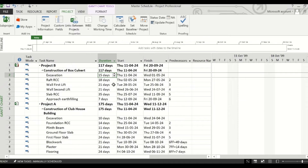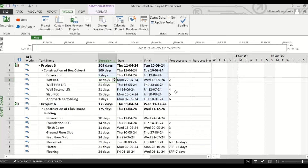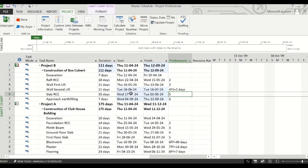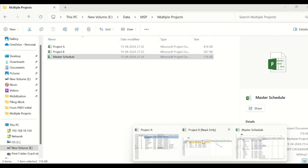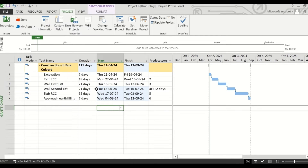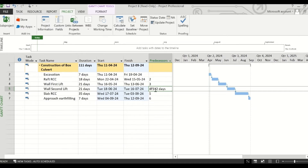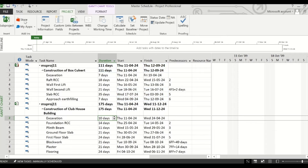If you change any of the duration or the predecessors of any task, that will reflect in the original schedule. Suppose you change the duration of the excavation to 7 days and you change the predecessor to 4FS plus 2. Then let us check in the original schedule of Project B whether these changes have been reflected. We open Project B, and you can see the excavation duration has been changed to 7 days and the link has been changed to 4FS plus 2 days.